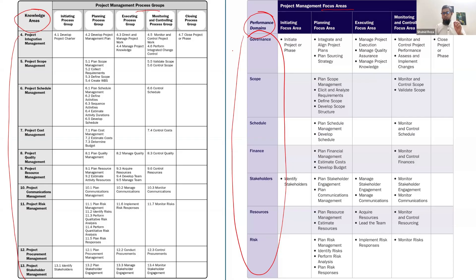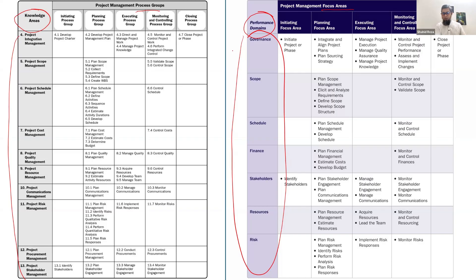For those who don't know the difference between knowledge areas and performance domains: the basic difference is that earlier knowledge areas were focused on outputs, but performance domains are more focused on outcomes. Earlier there were 10 knowledge areas; now there are 7 performance domains.